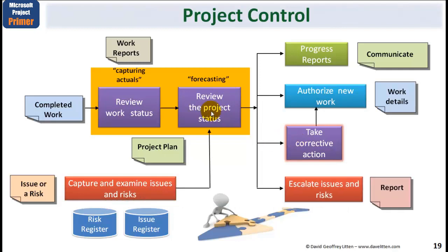The final piece, of course, I suppose, is that having looked at issues and risks and the situation thus far, when you see that what you're forecasting would not be acceptable, it needs to be escalated up to management in some way, often in the form of what's called an exception report. So the other activity of a project manager is not just managing, monitoring, controlling, but as part of controlling, where necessary, escalating this as and when appropriate.